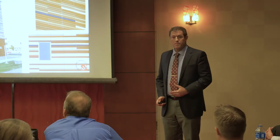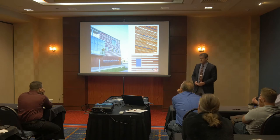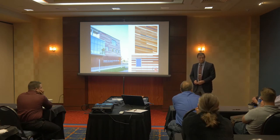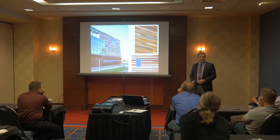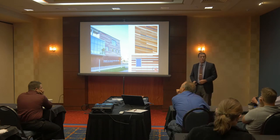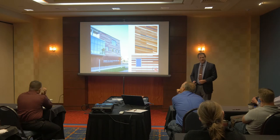What's behind the Corten? Is it also a precast? It's a precast panel. We left off the exterior, the insulation, the exterior wythe, and then put a fairly conventional insulation, and then kind of just a rain screen terracotta panel, Corten panel over the top. So I want to say we had about 3 weeks of installation overall. Remember how many panels were? I don't, off the top. We probably did 4 or 5 a day.